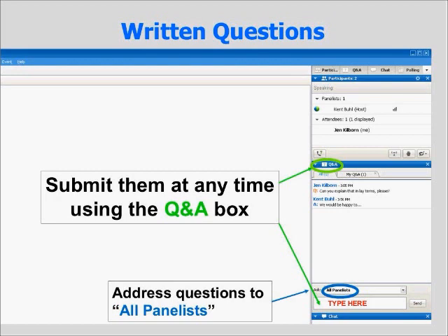On the other hand, remember we were talking about why you're doing this. You're doing it for environmental planning. And it makes sense to say, hey, what is this piece of property, even though I'm only doing demolition, is it in a floodplain? Does it have a high noise level? Is it near an above-ground storage tank? To highlight those environmental issues so if and when people start looking at future land uses, they'll have some environmental input in terms of making the best decision.